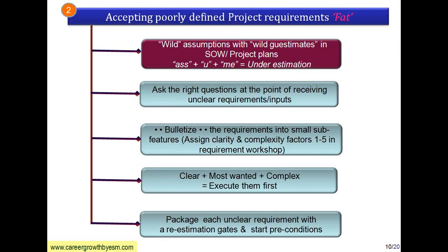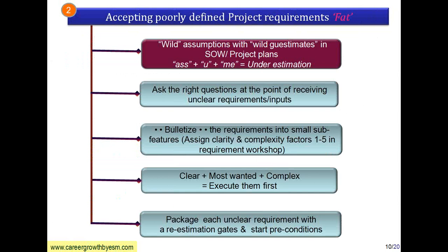Now this is another type of case. How do you handle poorly defined project requirements? Just to get the project, the pre-sales would have given some wild assumptions because there is always a huge amount of competition. So the pre-sales would have given wild assumptions to win the project. Now, when the project is won, you will see that the wild assumptions you made in your proposal are no more valid. Basically, if you break the word assumption, it is making an ass of you and me. If you have wild assumptions, the project gets underestimated. When you have underestimation, then you will go for shortcuts to do the project.